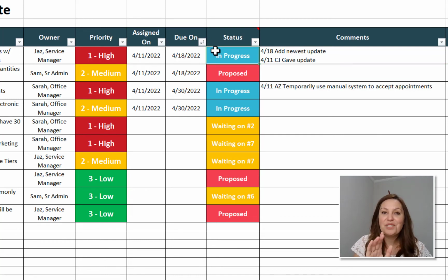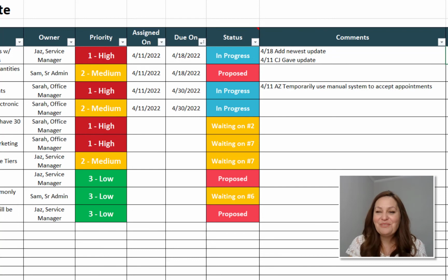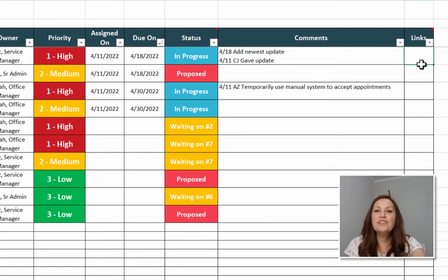We know we're going to update this action item, even if you haven't completed it. Now to move it to complete, as we said, we want to make sure that the whole team agrees that it's complete. And one of the ways that we can subtly reinforce that is ask for documentation. So we're going to move this to complete. You've said that this action established 3 tiers of oil changes with different guaranteed times, right?